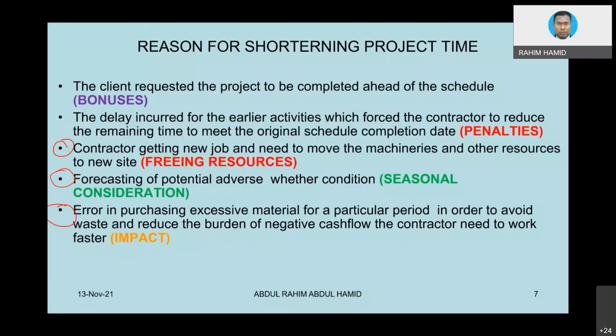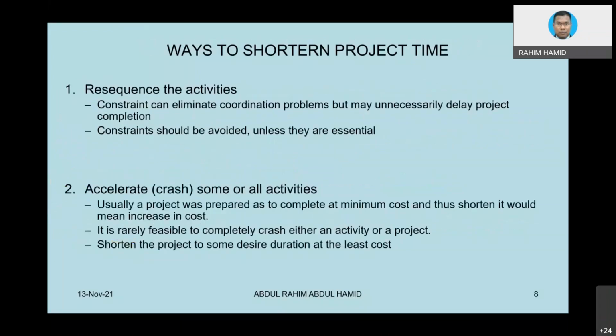But the clear cut is that if you already use that equipment or install that material in particular activity, for sure you are going to get payment. So in that situation, you will ease the burden of your cash flow. Okay, instead of just bring the material there and waiting to be installed, and it is getting to be stolen or basically rotten due to the weather condition. Why can't you speed up some of the activities so that that material can be used and then subsequently you will get payment?